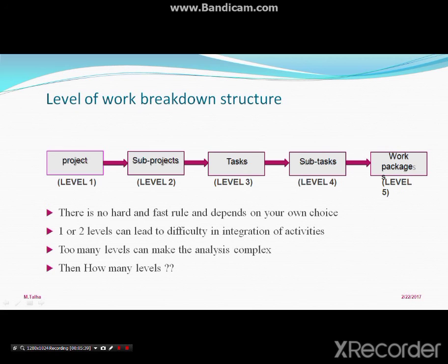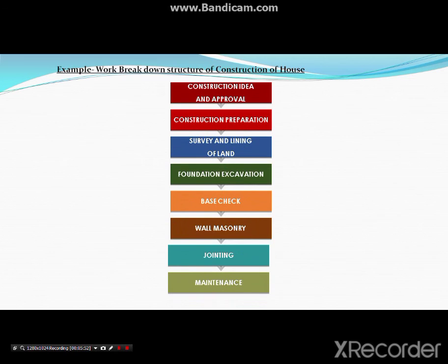One or two levels can lead to difficulty in integration of activities. Too many levels can make analysis complex, so too many levels are avoided. Then how many levels are required? Minimum levels are required so that the starting and completion of activities are seen properly.